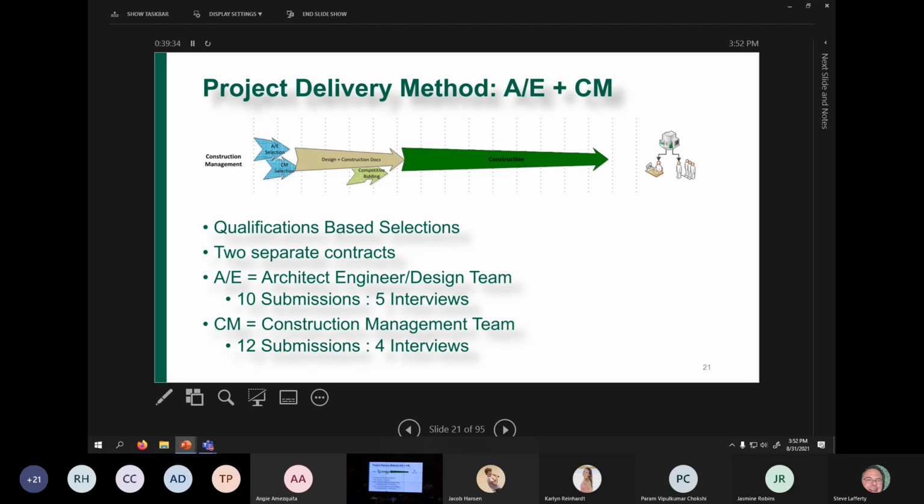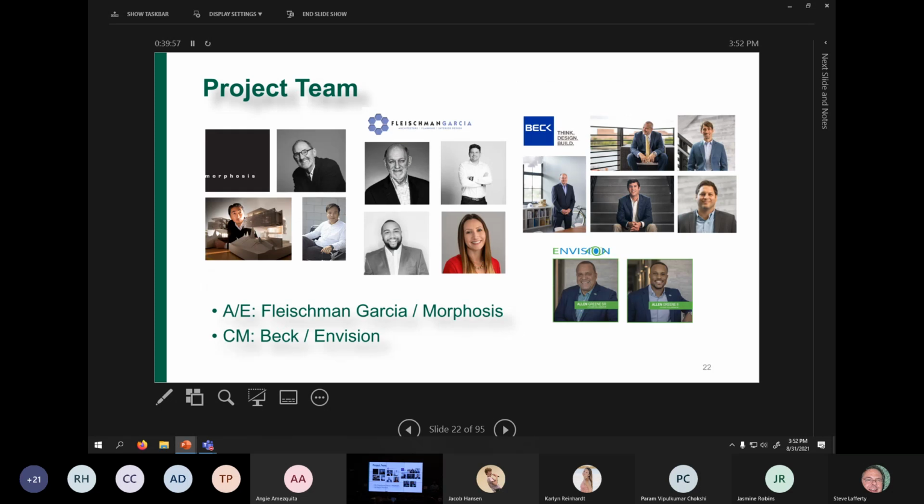In this project, as qualifications based, we received 10 submissions from AE teams, and from those 10 we selected 5 for interviews. Later, we had 12 submissions from the CM, and we selected 4 for interviews from there. And with that, we came up with our project team.